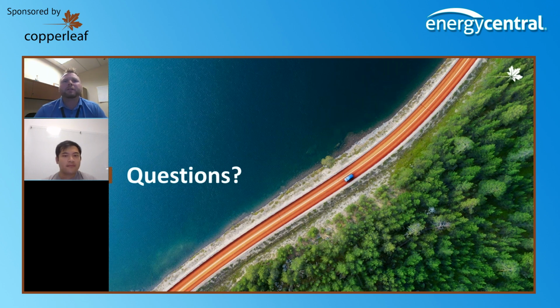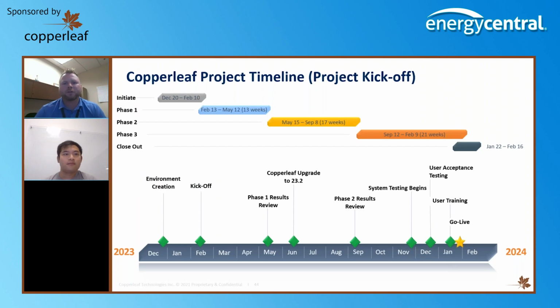We spent about 3 months evaluating technology solutions. Then from when we made the decision to move forward, it was roughly 14 months of heads-down work, contracts executed, working with the Copperleaf team. They had 3 consultants on there. We had a dedicated person from our reliability group, and we pulled in subject matter experts as needed to have different conversations along the way.